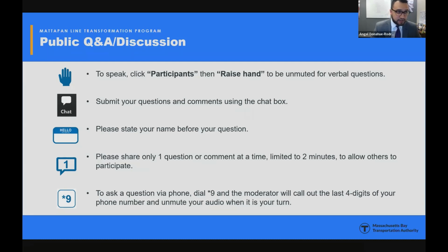And part of that is because the 0 to 50% design is the most critical, and that's usually the part that takes the longest, because that's where you're getting all of your foundational things. But we are doing everything that we can at the moment to make sure that we can accelerate that. As an example of that, as AJ mentioned in his presentation, we are doing land surveys, which is something that would typically be done at a later stage, to try and make sure that we're doing those little things at the beginning, and we can accelerate the project wherever we can. Yeah, Senator?